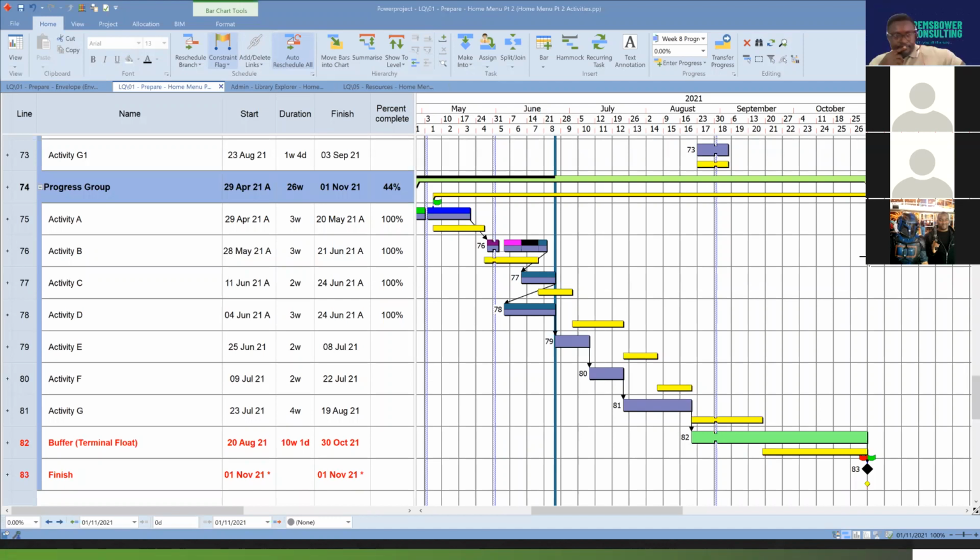But for this example, because we've been setting up the progress live at 100%, and we've been finishing before time, the buffer keeps increasing in time, but the baseline is to show us the originally projected plan. Is that correct? The baseline shows you your planned original start and finish dates for each activity.